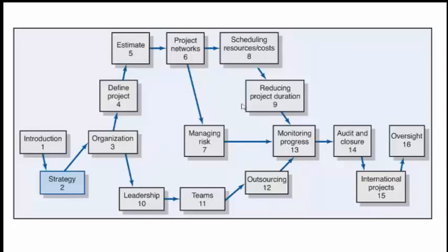So that's where the project network comes in. Once you go into the network, basically you identify, for example, analysis. After analysis only you go to the design. After design you go to coding and testing. So this is kind of a dependency. This is like finish to start. Once this finishes only you can start the next.